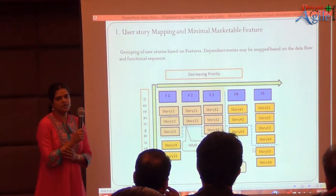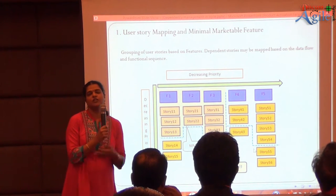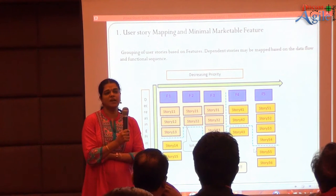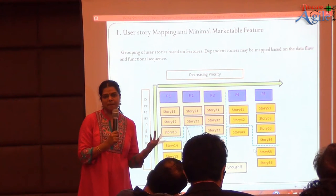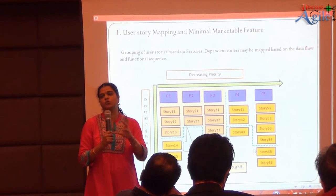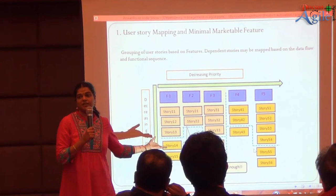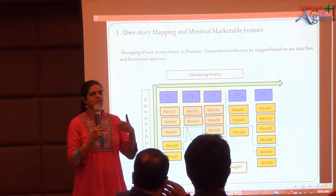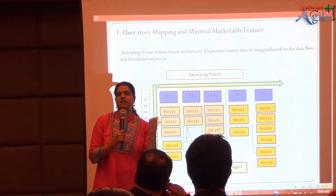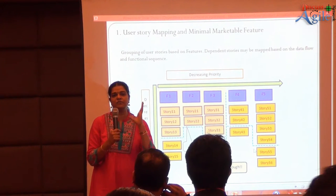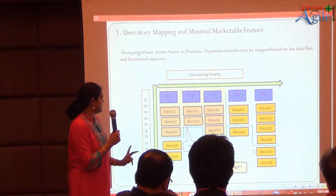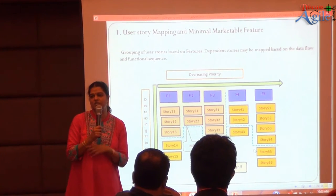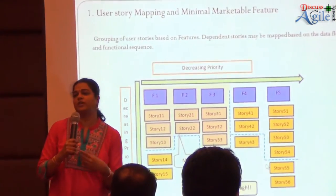The first approach is the concept of minimal marketable feature (MMF) and MVP — minimum viable product. User story mapping is the basis for having an MMF and a chain of MVPs. Unlike Waterfall where we build small components to develop the main one, in Agile we take the MVP route — finding the most wanted feature by the customer and working backwards to find the minimum path. This way you can group dependent stories to form the MMF and code, test, and build based on your MMF to build the MVP.